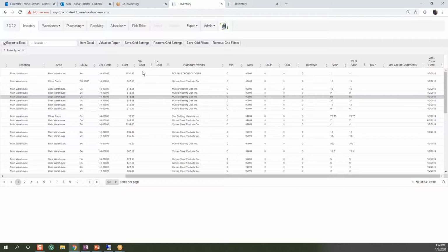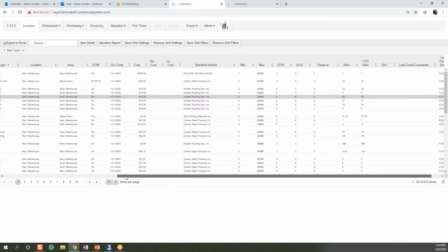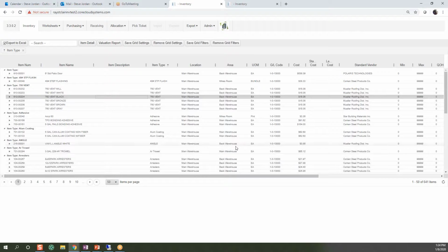We're also using standard cost just to pick up for the guys that don't use it for material management. They just want to have an item database. We use standard cost so that they can see how much the cost is. That's a prelude to something else that I'll tell you about, in the fact that what we're doing today is we have the integration being built for bill of materials management. That's where the estimator, when you come off your estimating machine and you want to create a bill of materials, you'll be able to basically import that bill of material with its estimate into that location. So for that functionality that we're building, we may pull in the standard cost. We may use that standard cost feature for this.